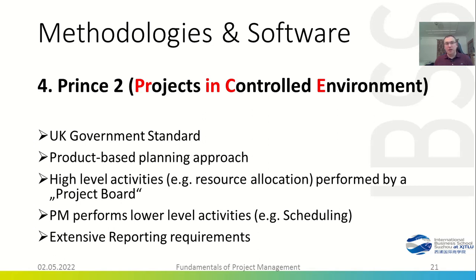Now, Prince2 is a government standard here in the UK, and it's a product-based planning approach. All the high-level activities, for example, resource allocation, are performed by a so-called project board, while the project manager performs lower-level activities such as scheduling, and it has the most extensive reporting requirements of all methodologies.